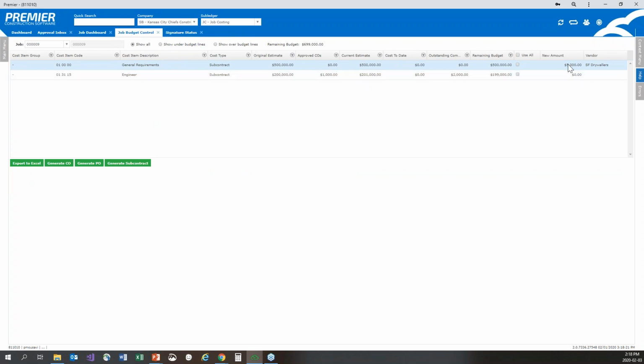And this time I'm going to issue a change order. So let's issue a change order for $10,000, okay? I'm changing the amount to $10,000. My vendor is still going to be the SF Drywallers, and I'm going to go ahead and generate a change order.